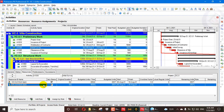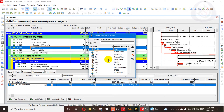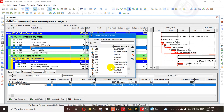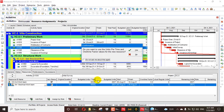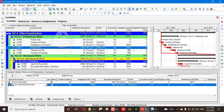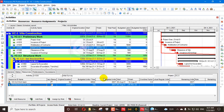Its units per time is 469 and hour time factor is 2.0, while the other is 3.0 for example. When we change this resource to any other resource — for example, Electrical Work — it asks: do you want to use the units per time and hour time value for the new resource? When I say yes, the value will be changed to use the Electrical Work team's units.